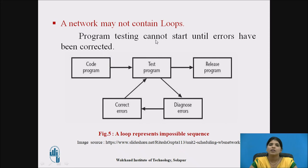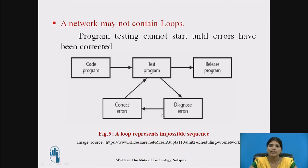The next rule is that a network may not contain loops. Here the network contains a loop — test program cannot start until the errors have been corrected. The problem is we do not know how many times the loop will be executed. So instead of looping, we have to draw a sequence of activities.